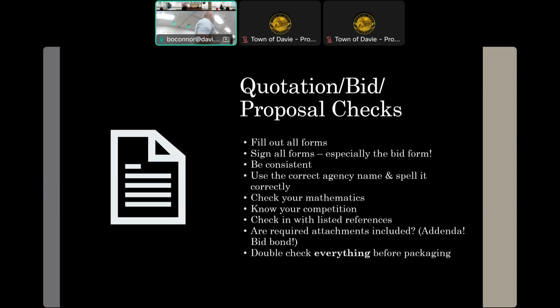If we put out addenda, make sure before you submit your package that someone goes back and looks at them, because something may have changed. There might have been something else added. There might have been a scope change. Not including those will get you thrown out.